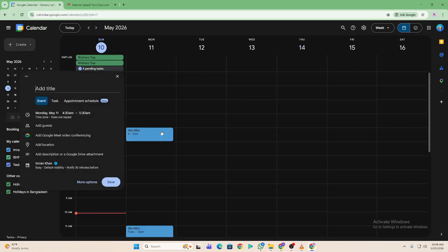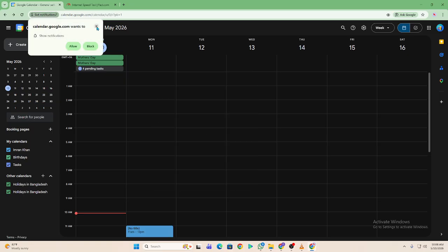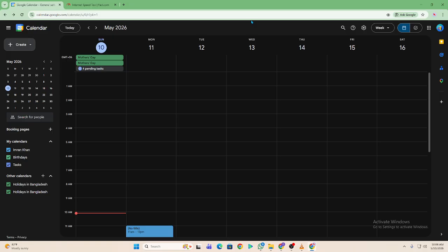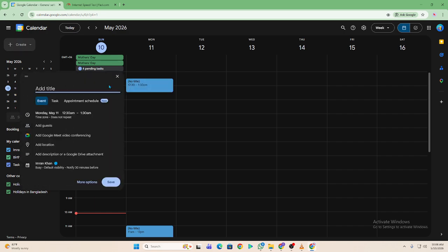Give your calendar a clear name like Website Launch Project or Marketing Plan so it's easy to identify. Now start adding tasks as events, like research, design, or deadlines for deliverables. Use different colors for different types of tasks, like planning, execution, and review stages.